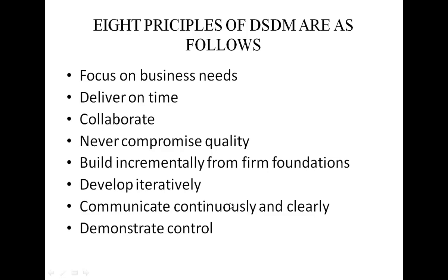It is essential that you are able to prove you are in control of your project. One way of achieving this is by making plans and progress visible to everyone. You have to make plans visible to everyone, and formal tracking and reporting should also be carried out.